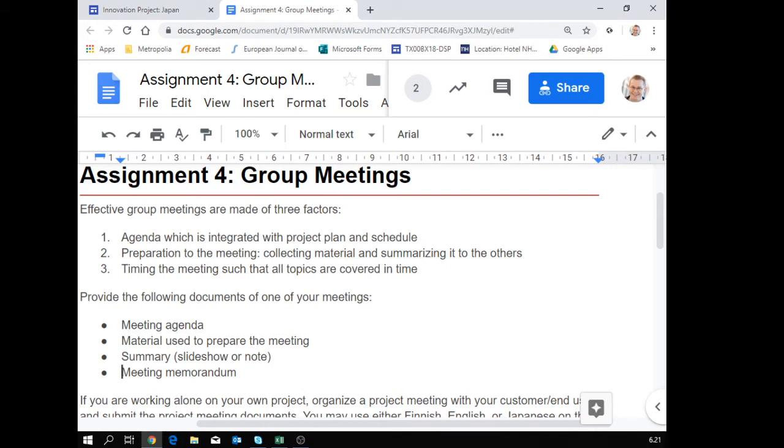Moving stuff earlier is actually smart because then you don't have the overhead time on the project. And then you would have some time in the bank in case you need it right here at the end, because you have a very, very strict deadline here. So that is for the updated time chart. Yes, good. What else? Well, that's actually the most important part.